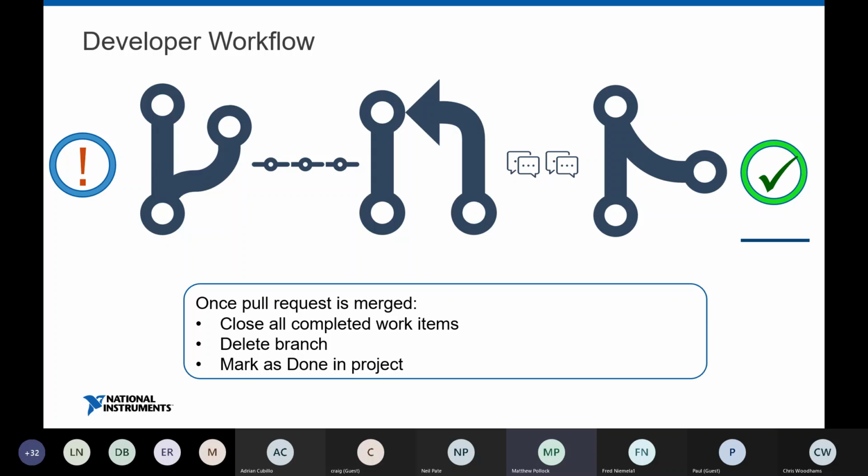But for example, I've worked on projects where it was a €500,000 semiconductor test system. We don't get a spare one of those to play with. The only one is the real one at the customer's site. In those cases, we have to do our due diligence as much as possible to minimize obvious defects, and then work with the customer to test it out on their system only when we've done everything that we could on our side first.